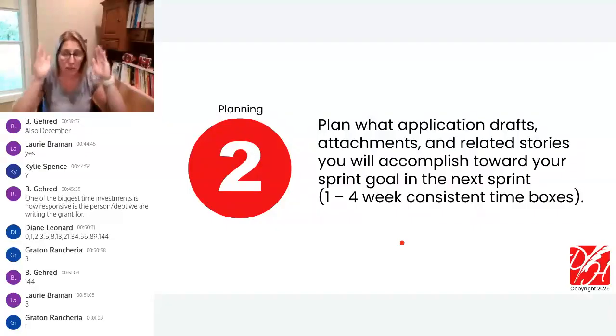But let's run this quick list that we have coming up in the next 2 weeks, and let's talk about if there's any impediments we see, who can help with what, where will you be available? Oh, you're going to be at a conference next week? Okay. Could you do this? Could you commit to this? Could we plan for this to be done this week before you're at the conference? So high level, not moving all sorts of stuff around, not creating big plans and documents and big reports. Conversations about what can our commitment be in the next short period of time. So that might be something you want to try.